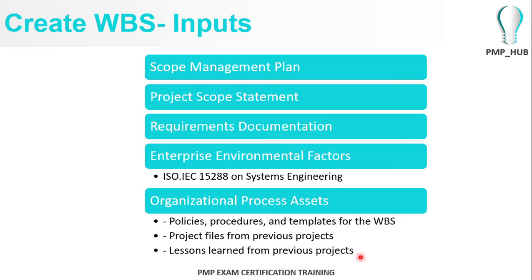Sometimes you're bounded by your organization's standards, the development standards they adhere to, and also the organization's processes and procedures. Or if you're in a large PMO, your PMO will define how you should structure your work breakdown, whether it should be phase driven or deliverable driven. So they will guide you at a high level on how you as a project manager should break it down in your work breakdown structure.